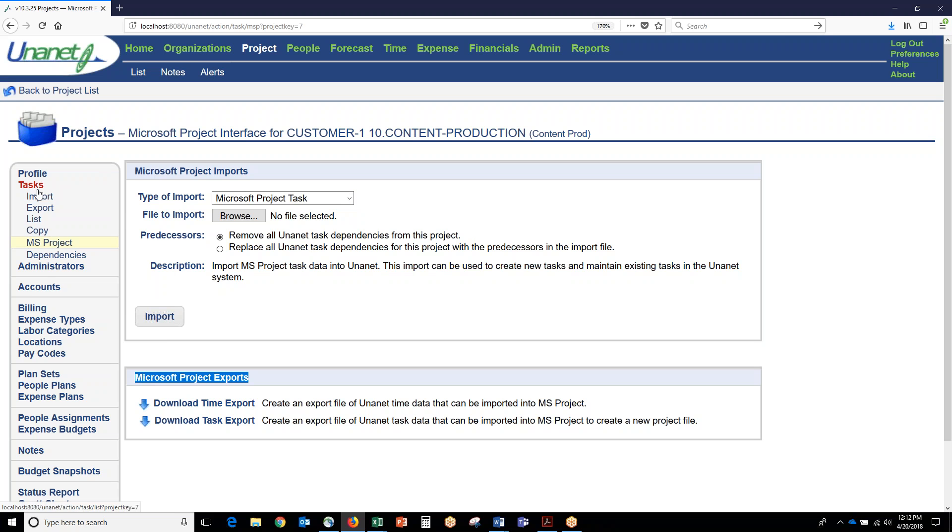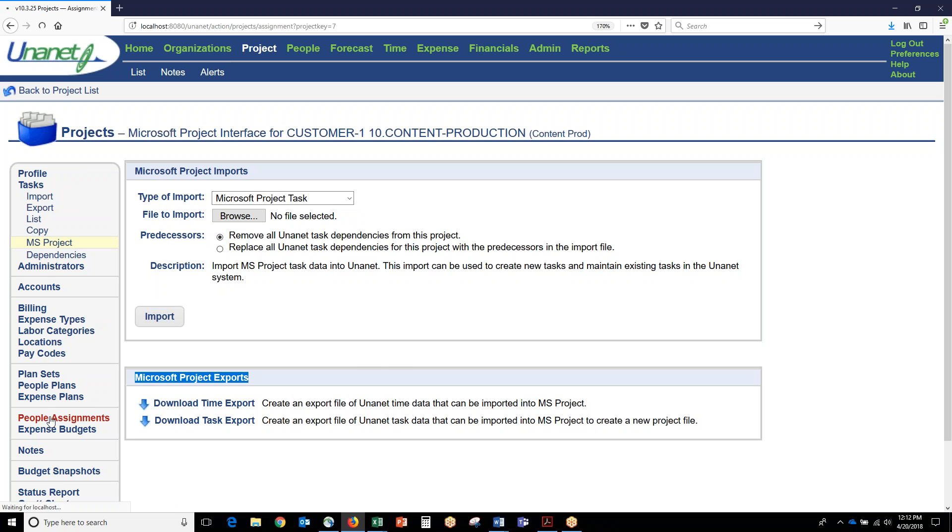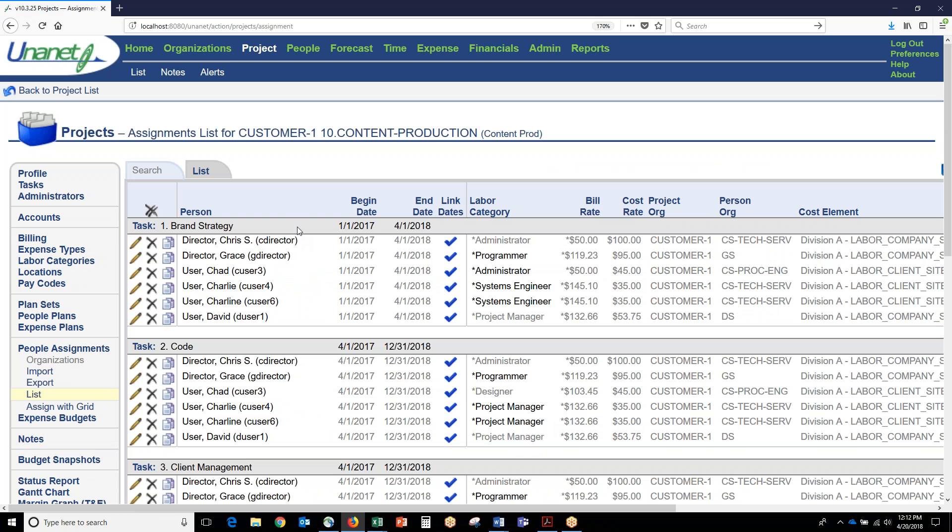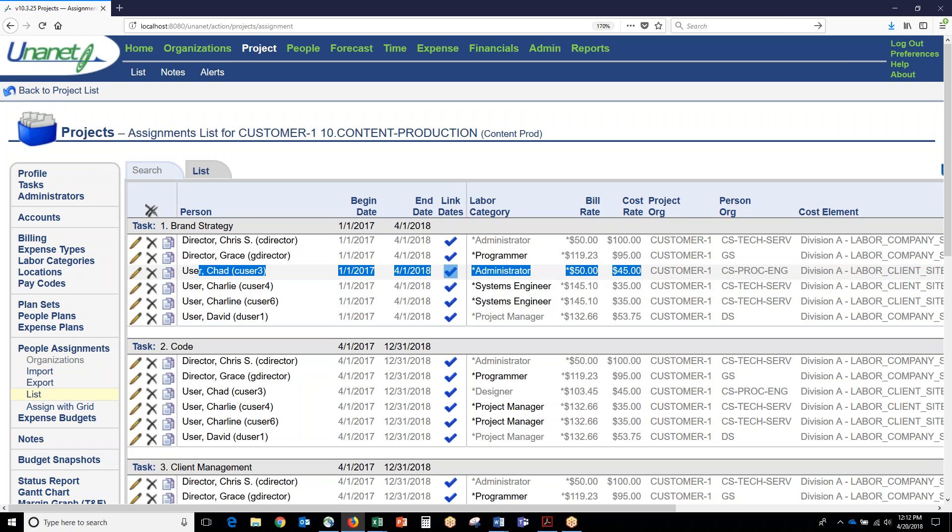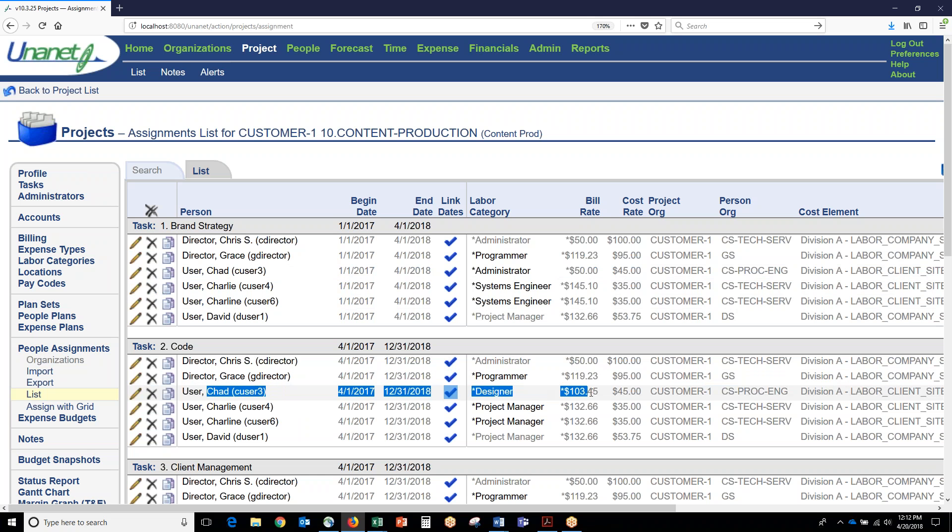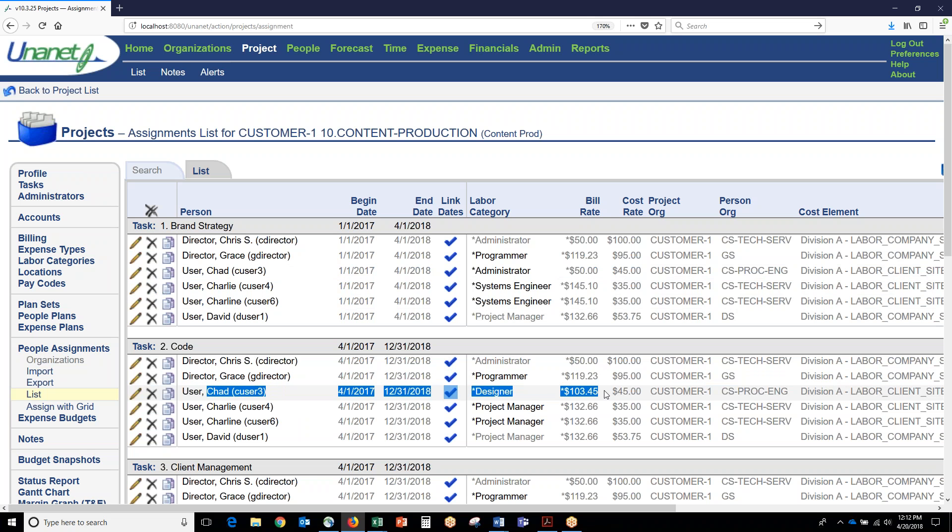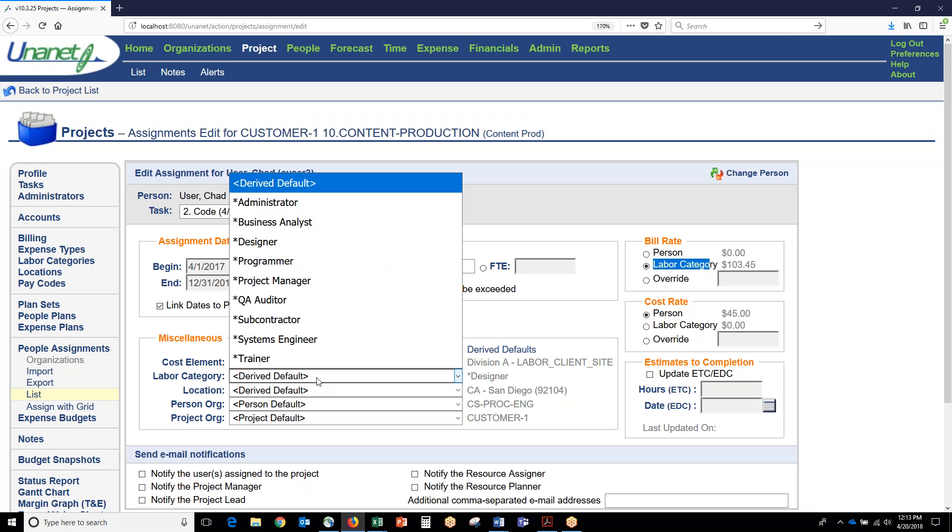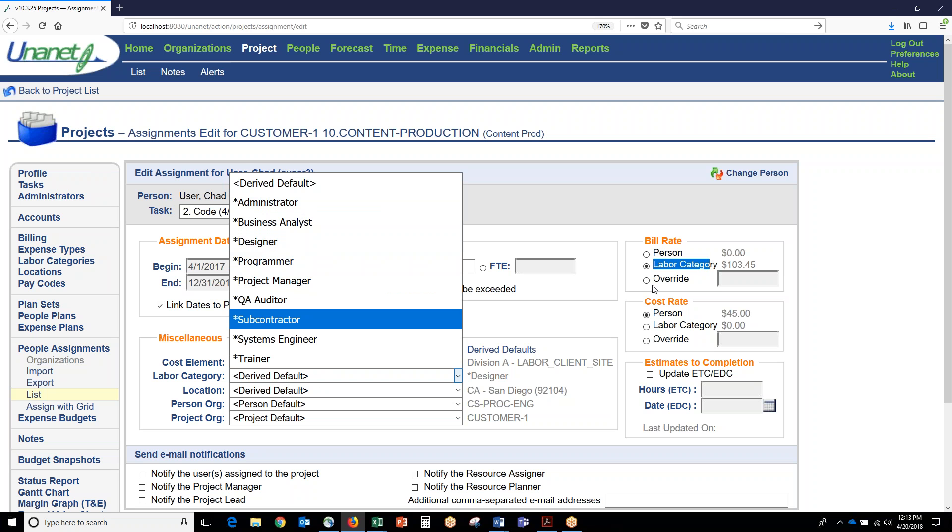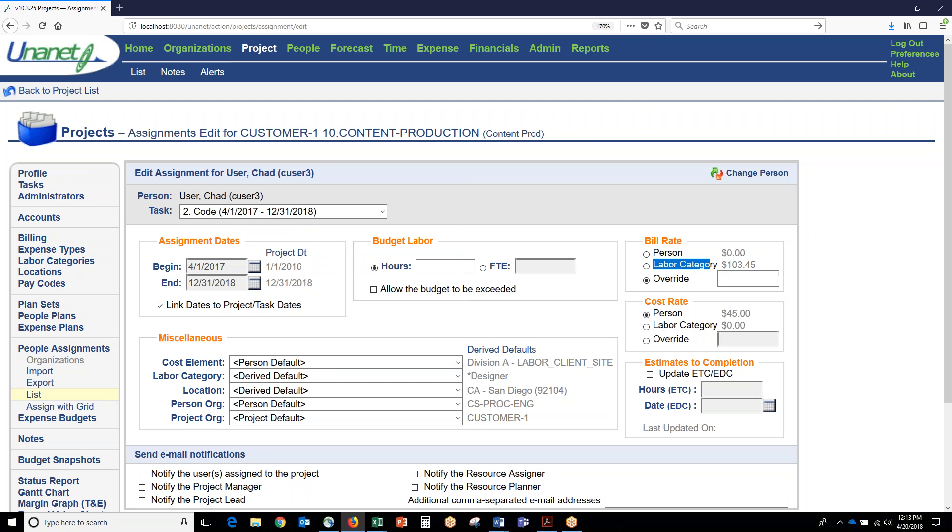In addition to tasks, we talked about how you could have different rates for different people. This is just an example showing you that Chad User is an administrator at $50 an hour on the first task here, brand strategy. The same guy is a designer at $103.45 an hour on code. We can either use the person rate, we can use the labor category rate which will change based on the labor category we select, or we can actually just type in our own rate if we have an override rate here.